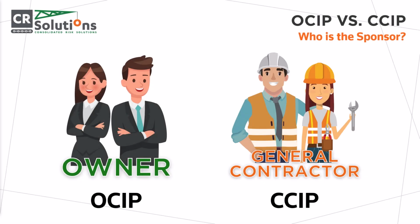Typically, a wrap-up is purchased by either the project owner or a construction manager or general contractor. If purchased by the owner, it is referred to as an OCIP, or Owner-Controlled Insurance Program. A maintenance wrap can also be purchased by facility owners to cover continuous ongoing construction. If the wrap-up has been purchased by the GC or construction manager, it would be referred to as a CCIP, or Contractor-Controlled Insurance Program. These wrap-ups can be purchased to provide coverage to a single project site or multiple project sites, called a rolling CCIP.